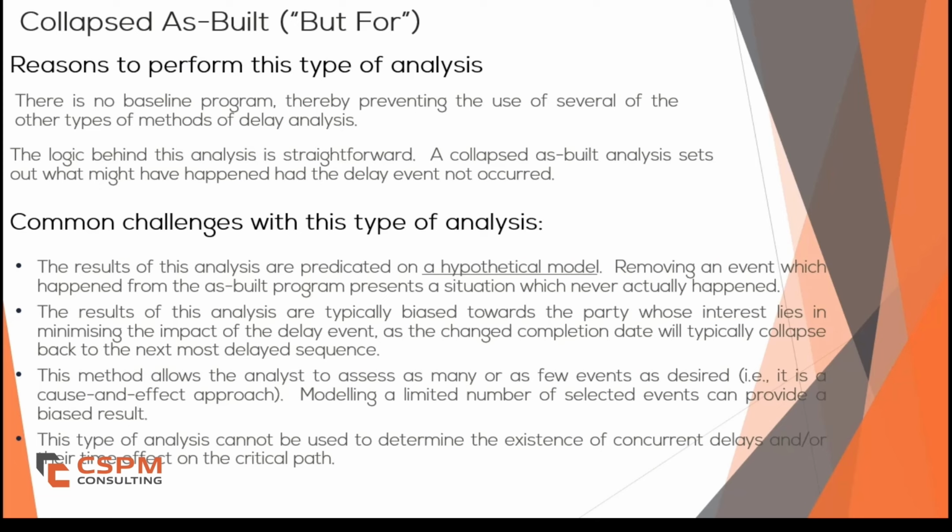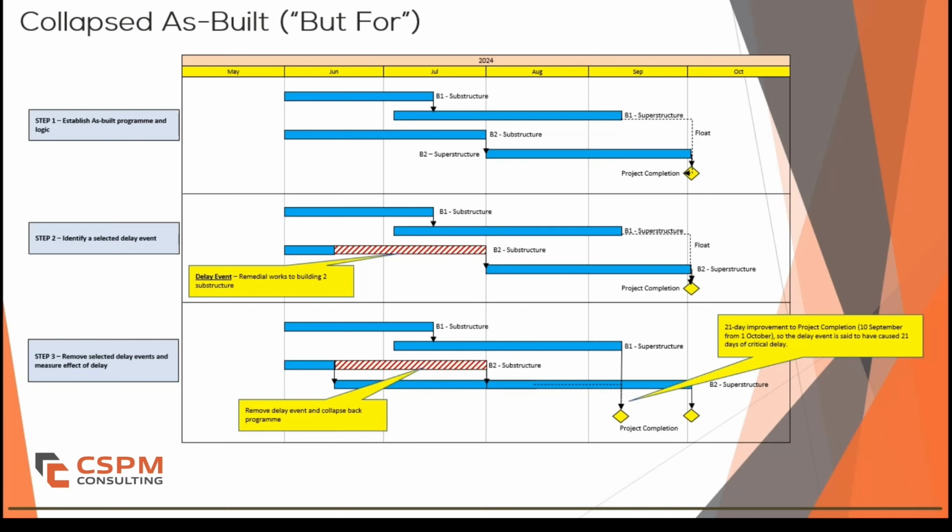These three challenges make collapsed as built less reliable in formal contract disputes. However, if there is no baseline schedule available and we only have an as-built schedule, this method may still be used to gain insights into delay impacts, as long as its limitations are clearly acknowledged.